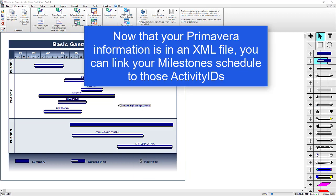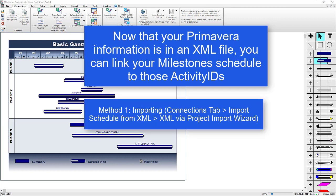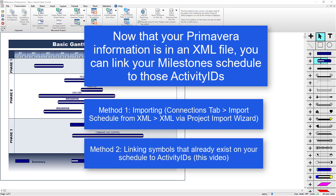Once you've got your information in an XML file, you can link your Milestones schedule to your Primavera information. There are two methods to do this, either by importing your whole file in the Connections tab Import Schedule from XML file, or by manually adding symbols and linking them back to Primavera tasks, which is what we'll be covering in this video.